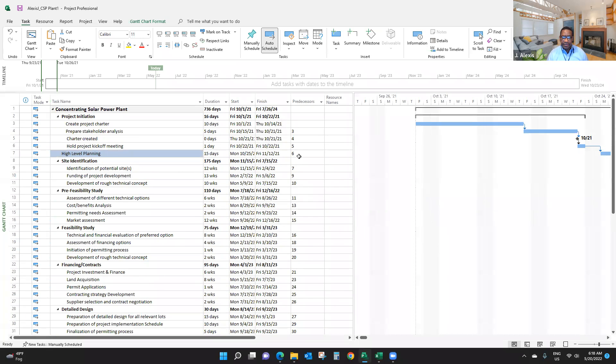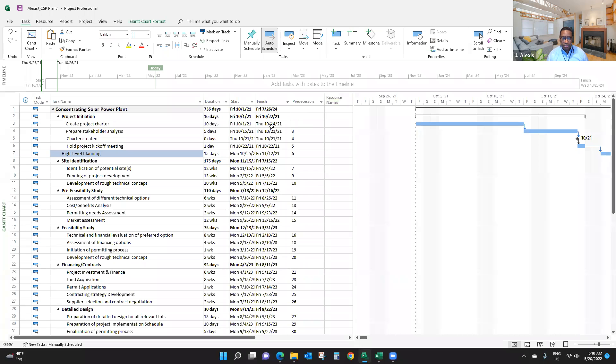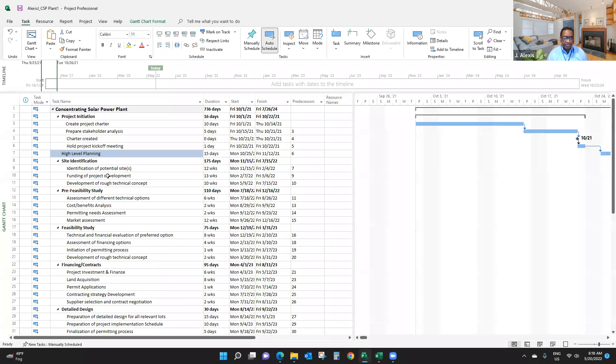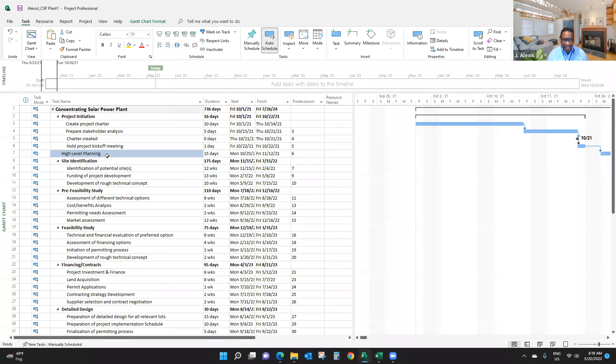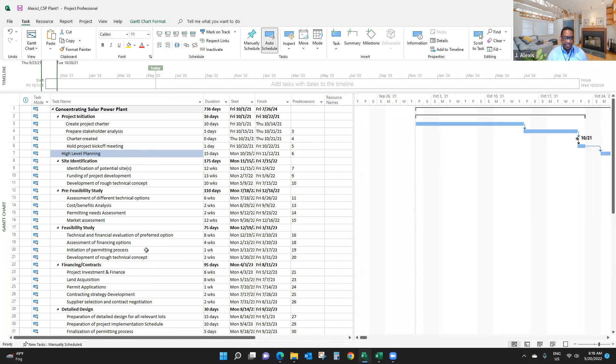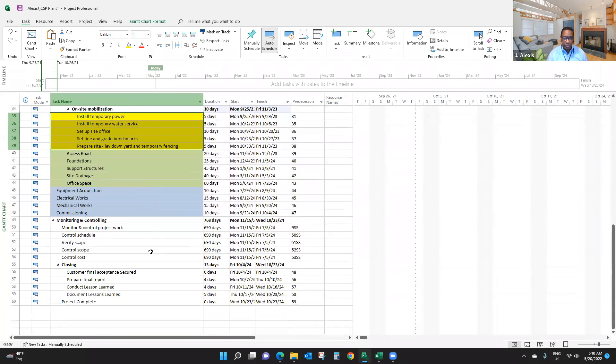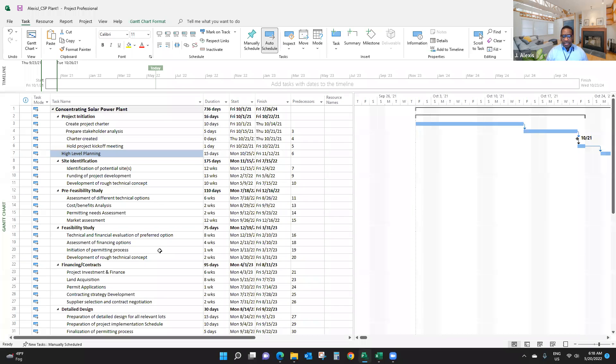Now, when I take a look at the predecessor column, I want to make sure that every item has a predecessor except the first one, and obviously not the summary activities because I linked the sub-items. But if I didn't break down something, I must link it. As you can see here, I didn't break down high-level planning yet, so I linked it with the previous activity. That's how you do it. That's going to be all for today.